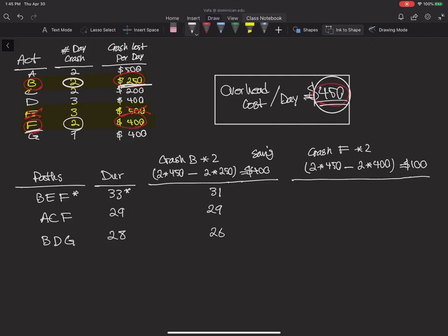And the length of my project will go down by 2 days. Instead of 31, it's going to be 29. I'm sorry, ACF, since I'm crashing F, ACF also goes down. Instead of 29, it's going to be 27 days, and BDG will not change.